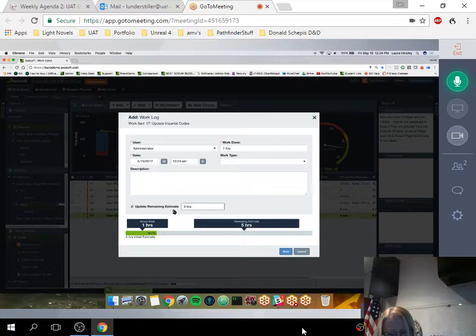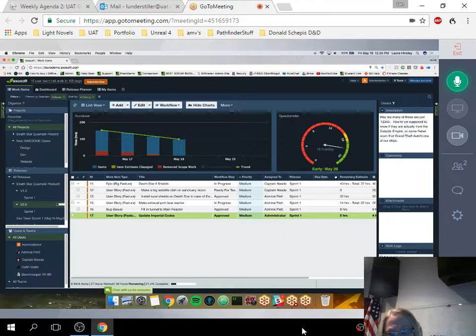They can manually override that remaining estimate and see that actually just increase my velocity a little bit, and we're still going to be early for our due date. But my velocity did jump from 17.64, whatever it just was, now up to 18. So that is essentially all you need to start getting this information. You need to add a sprint, we need the start date, we need the due date, then you need items with estimates in there, and then your team just to simply work on those items.